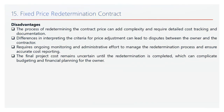While the fixed price redetermination contract offers flexibility, it also comes with notable disadvantages. Added complexity: the process of redetermining the contract price can require detailed cost tracking and documentation, making it more challenging to manage. Risk of disputes: differences in interpreting the criteria for price adjustment can lead to disputes, potentially causing delays. Ongoing administrative effort: managing the redetermination process requires ongoing monitoring to ensure accurate cost reporting. Uncertain final cost: the final project cost remains uncertain until the redetermination is completed, which can complicate budgeting and financial planning for the owner.